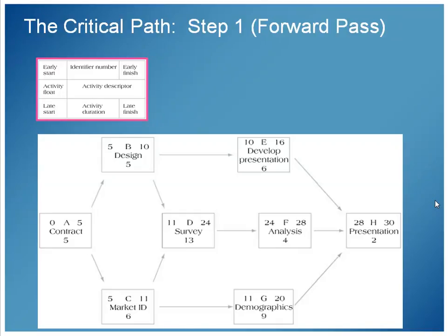We can make a forward pass of coming up and adding the duration to each one of those. And again, just notice the duration. It's real easy. The start time plus duration gives us the end time. Start time plus duration gives us end time. So I know there's a lot. The first time you look at that, it's pretty complicated and busy, but it's not such a big deal. Okay, so now what do we do?